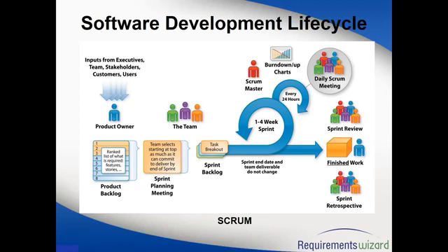But the most important role the BA will perform in this kind of environment is to work with the product owner, right, on a one-to-one basis and groom the product backlog. Because I introduced one more new term, what is a product backlog here? You might think you know what this new term is. So product backlog is nothing but a list of requirements which are dumped in one place and which can be prioritized by the product owner. Right? So think about that.